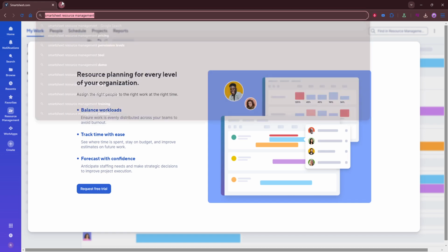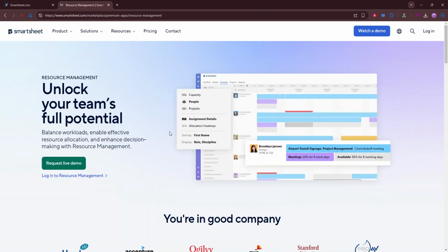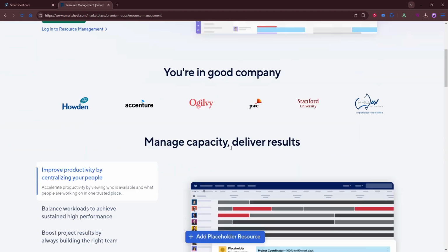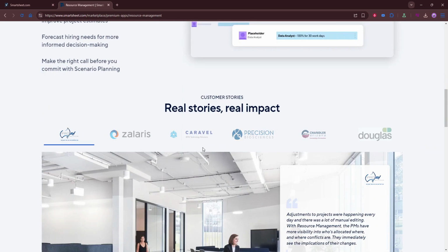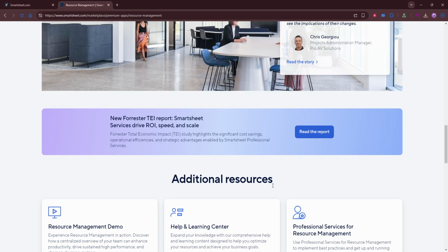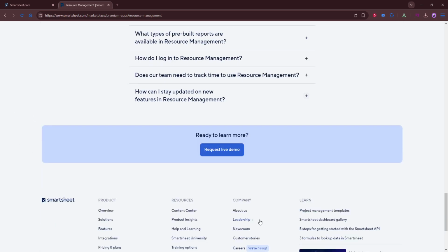After that, enter availability, roles, and capacity details for each resource. This step is especially important because it tells the system who can work, what kind of work they do, and how much work they can realistically take on. Be as accurate as possible here. If someone works part-time, has limited hours, or fills a specialized role, that information will directly affect your planning views and assignment decisions.